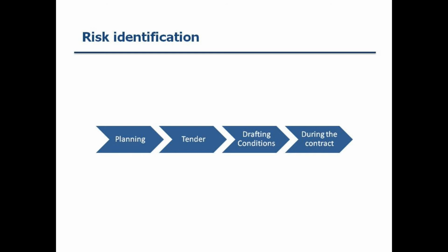And a part of those risks are both technical and administrative. Technical meaning that there's peculiarities in construction methods or design which have a potential to cause injury to persons or damage to adjoining properties. There may be uncertainties due to soil texture or high water tables. So all these risks need to be taken into account, and they're technical.